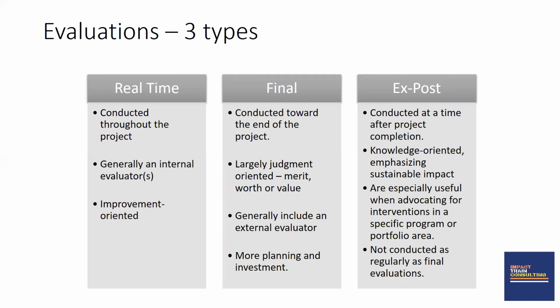Real-time evaluation is usually conducted by an internal evaluator. So this will be done by the organization or members of the project team, the monitoring and evaluation team within the organization. Midterm reviews or real-time evaluations are conducted throughout the project because you're trying to improve on how well things are being done. This evaluation is not looking at passing blame or judgment, but you're just trying to see how to improve further on that project.